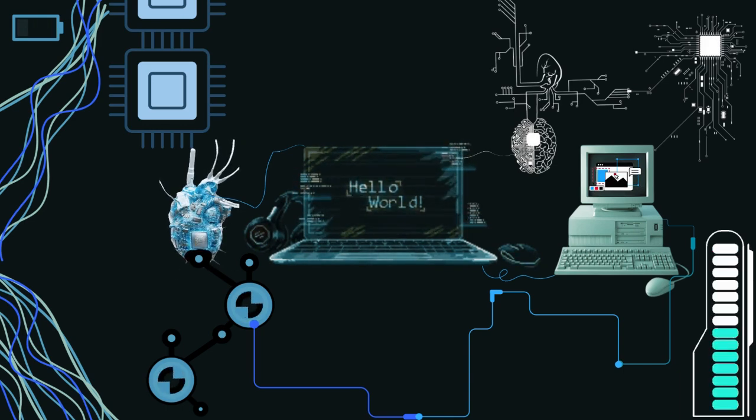This prototype is then shared with the customer for feedback. Based on the customer's suggestions, the team modifies the prototype and improves it. This process repeats until the customer is completely satisfied. Once approved, the final system is fully developed using the iterative waterfall method. Okay, so the advantages of the prototype model include a demo working model.